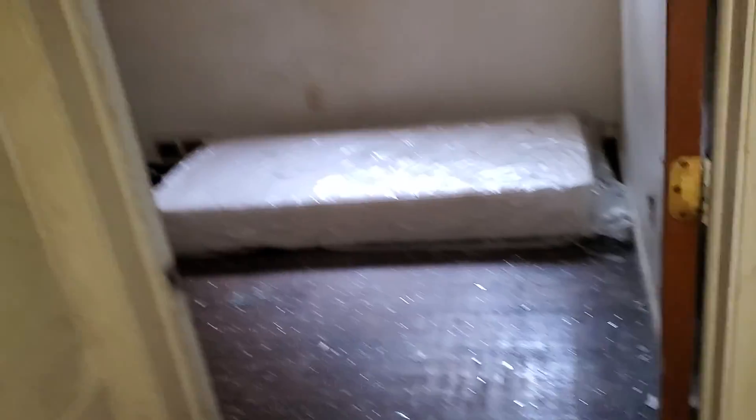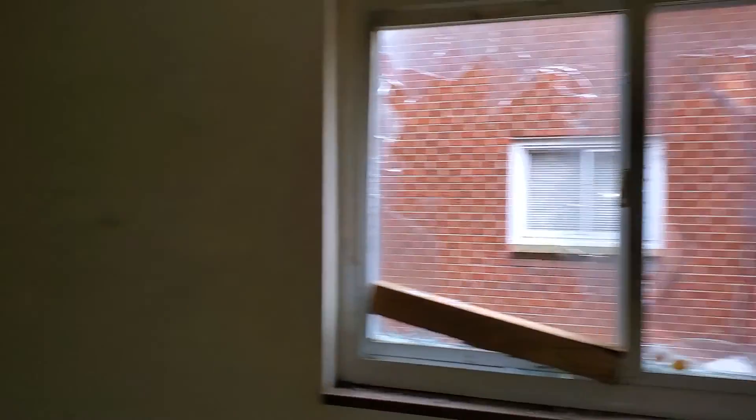All the door handles are broken. I recommend just replacing all the doors because all the doors are broken. Bedroom two, back right: paint the walls, paint the trim. Broken window, new light fixture, paint the ceiling and walls. New outlet covers, light switch covers. Need a new closet door. I recommend a new back door.